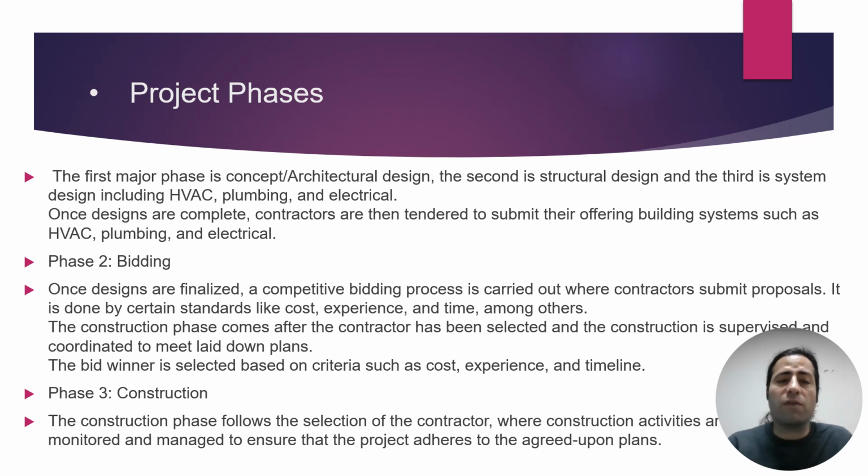Once designs are finalized, a competitive bidding process is carried out where the contractors submit proposals, judged by certain standards like cost, experience, and time, among others. The construction phase comes after the contractor has been selected, in which the construction is supervised and coordinated to meet the laid down plans. The bid winner is selected based on criteria such as the cost, experience, and the timeline.